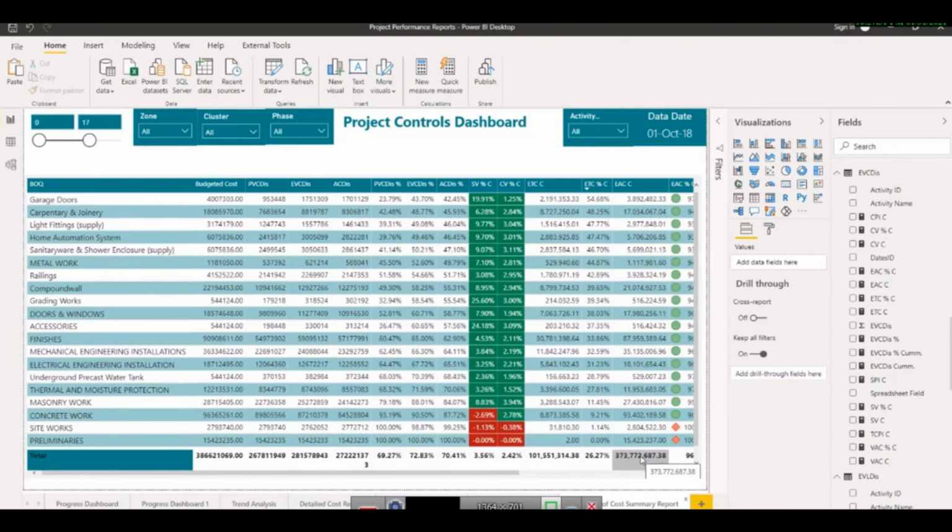In resource, you need to see what types of resources are available there. Resource means you are going to monitor or analyze things at resource ID level. Resource ID can be for material, for non-labor, and for labor. So apparently we are going to make at least 3 reports for resource ID: labor, non-labor and material. Now you need to think what is available in material, what is in non-labor. Definitely you will be assigning man hours to the labor. So first let's go for labor.